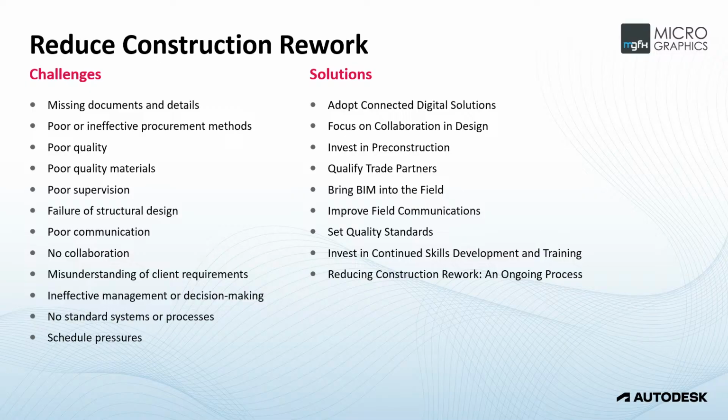And one of the engineering teams ended up working on the wrong files for a week. So 20 people at 1,000 rands, or about $100 an hour or whatever, been working for a week. Incorrect work, can't submit it, projects late, penalty fees, then people have to work late, they get irritated, the money's been wasted, and that is a very bad situation just from a design side.